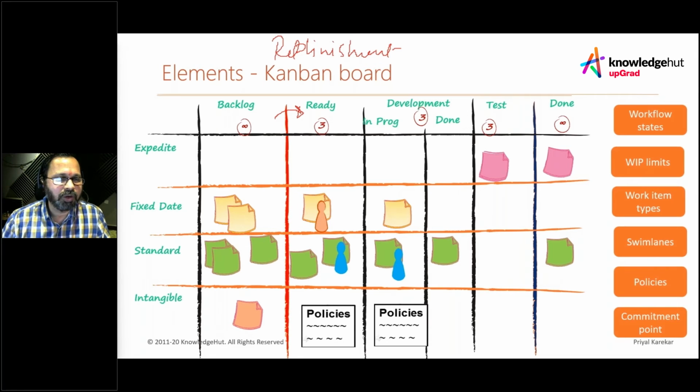You can tell the stakeholder, oh, by the way, stakeholder, you know what, I have a WIP limit of about 8 now, and I already have 3 items which are to be started. You can maximum prioritize another 5 items, which I can take as a key takeaway from this particular meeting. So he gives you number 1, number 2, number 3, number 4, and number 5 items here, and total 8 is the WIP limit, right? And from there you can start moving it, and maybe at every frequency you will be able to do that. Now I don't know, this is not showing in another color, but this is your delivery line, okay?